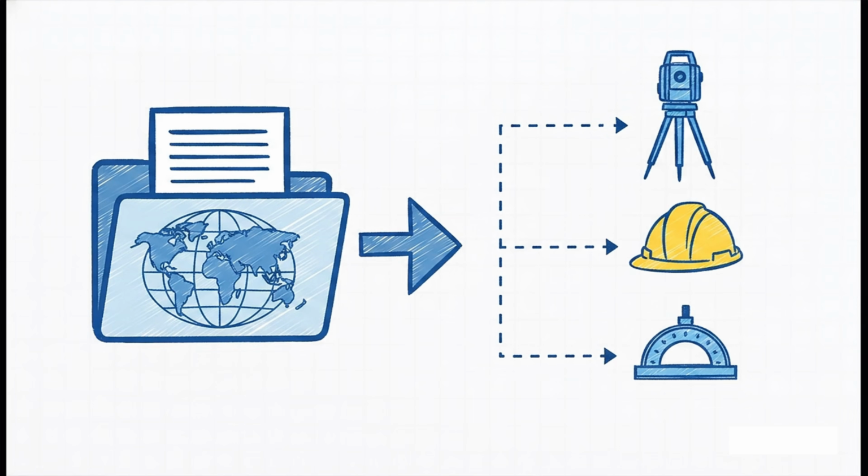But the ultimate export feature isn't just a high-res picture. When you export from Nearmap, you are exporting geo-referenced files. This means the file actually contains rich, embedded spatial data, like NAD83 California zone data, for instance. This is an absolute necessity for your civil teams, your landscapers, and surveyors who rely on exact real-world coordinates.